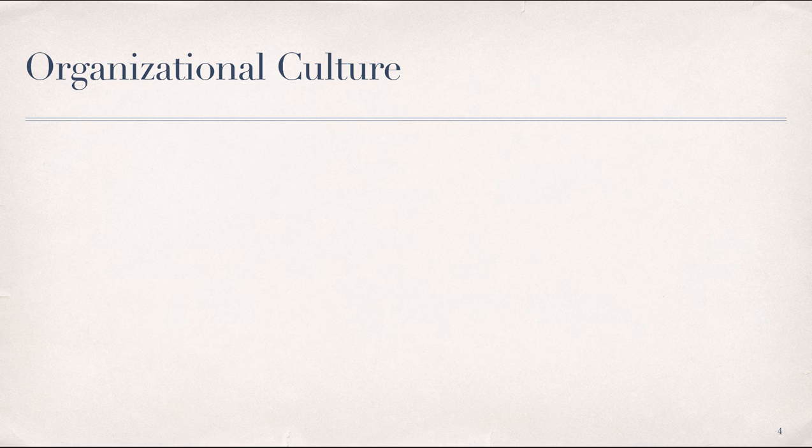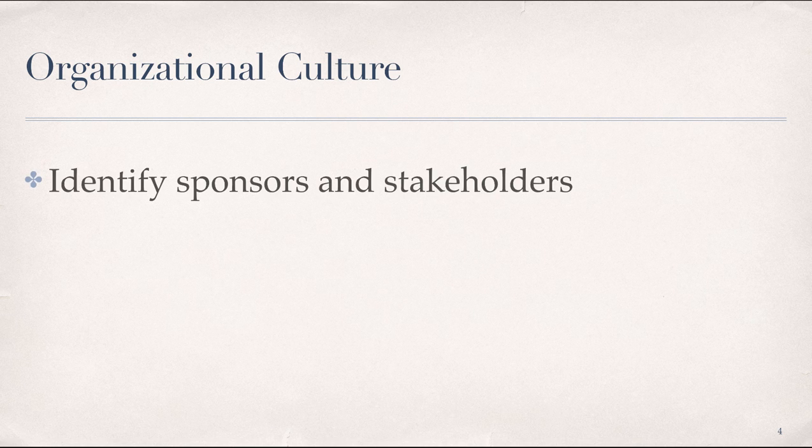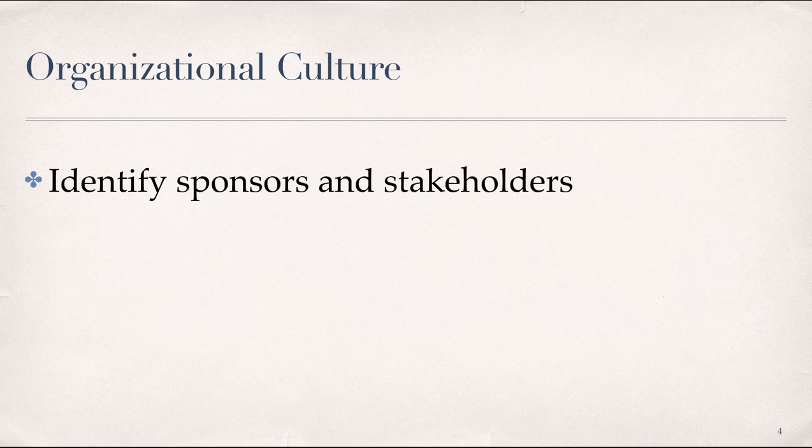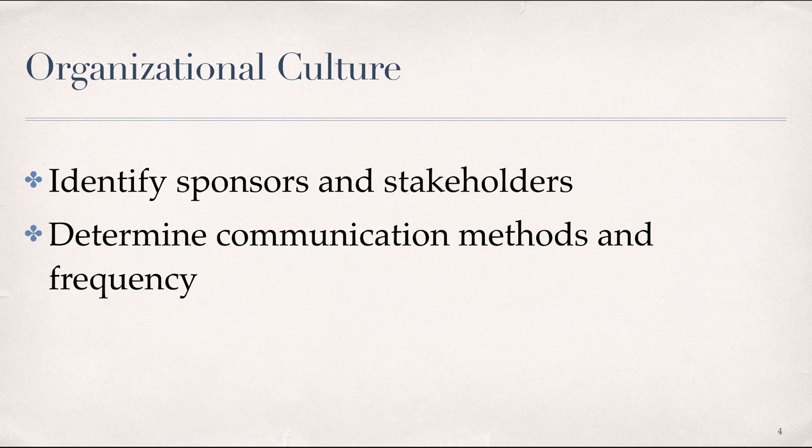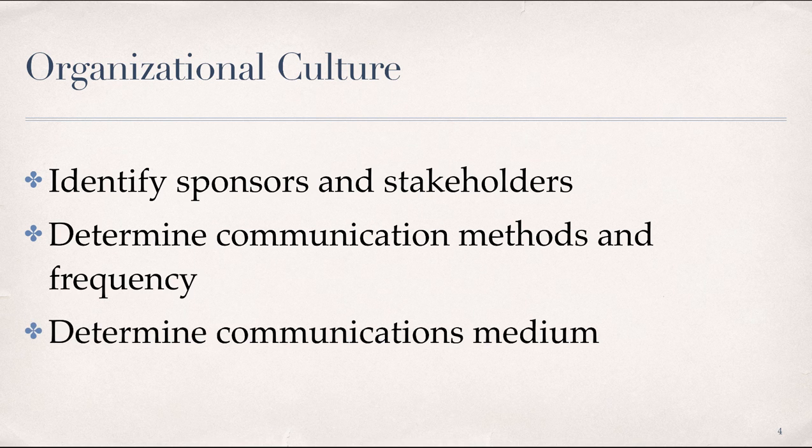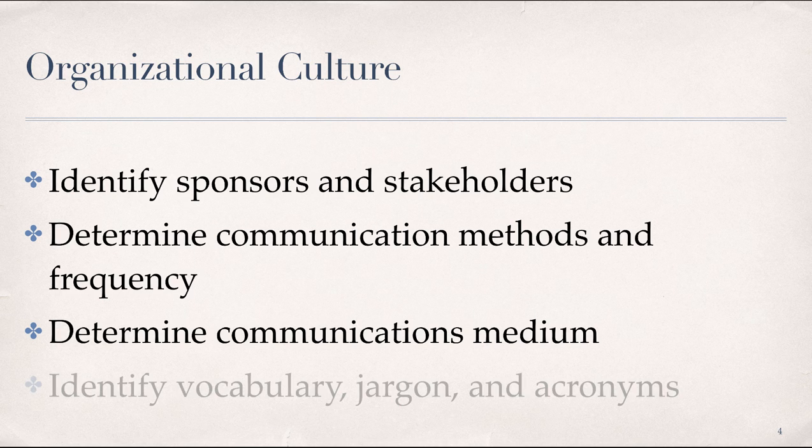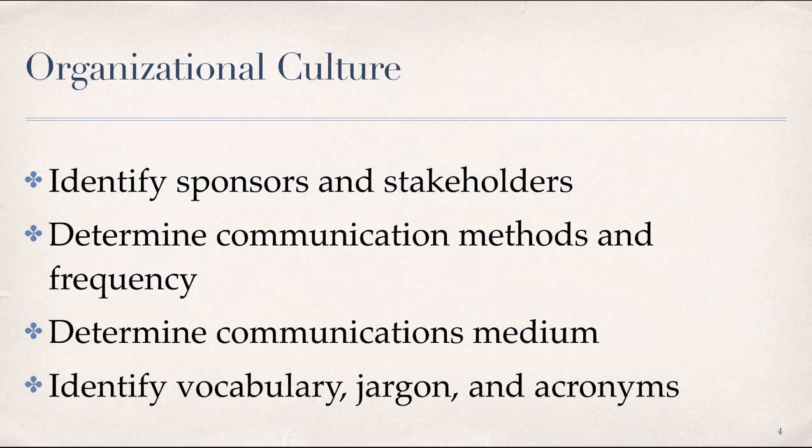This requires the project manager to possess the following business competencies: the ability to identify sponsors and stakeholders along with decision-making levels within the organization, determine communication methods and frequency based on the culture, organizational business practices, and needs of the project, determine a preferred medium for communication, and identify any vocabulary, jargon, and acronyms that are unique to the organizational culture.